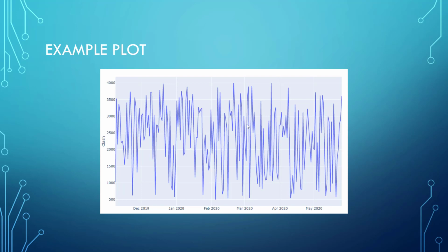And we can start finding correlations, too, as we start accumulating a larger data set from multiple projects, from multiple sectors, to see that when we reduce clash or start to apply that workflow of resolving clashes on a project, that we do get reduced RFIs or reduced change orders or reduced things that ultimately cost the client more money, cost more time for the project team.